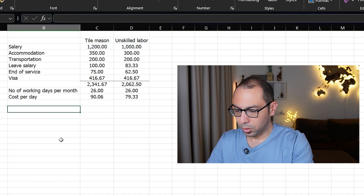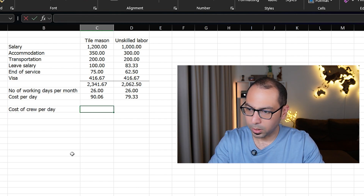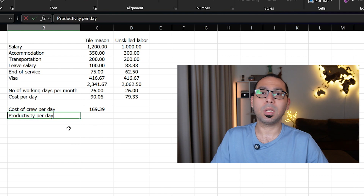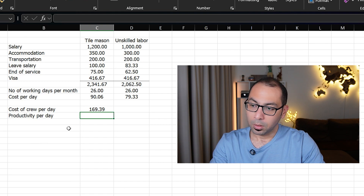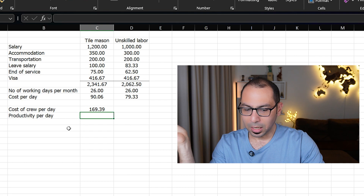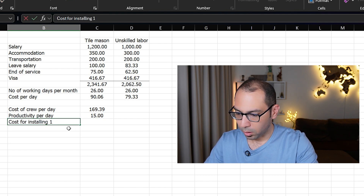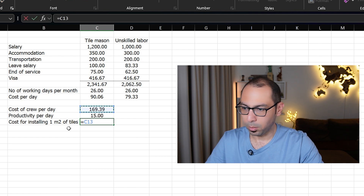These two — the tile mason and the helper — form a crew. The cost of the crew per day is the sum of both, which comes to around 170. Now the question is: what can this crew of 170 per day actually do in the project? This brings us to productivity — how much output per day. For example, if this crew can install 15 square meters of tiles per day, then the cost per square meter is 170 divided by 15.